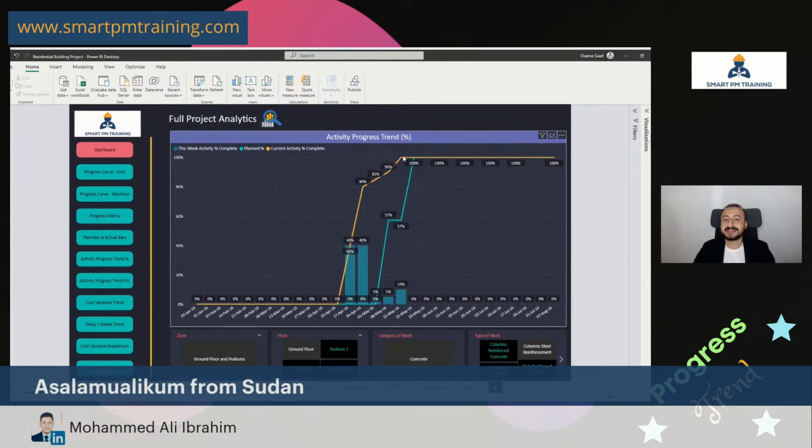If you are like 99.9% of planning engineers, you act on delays only. So you wait until you have delays in the project, and you report them to the top management. What will happen is you will eventually get your additional manpower, but it's going to take 2 weeks. But guess what? 2 weeks later, you don't need 5 additional steel fixers anymore. You want more because you have to account for the additional delays that occurred over these 2 weeks.